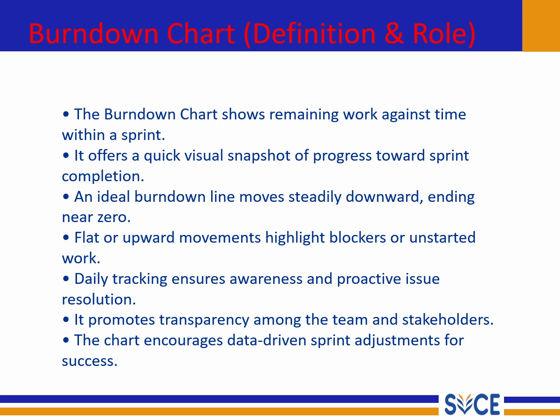You don't have to go through the reports, just a glance at the chart tells you whether you are on track to finish on time. In a healthy sprint, the burn down line should move steadily downward, gradually reaching near zero by the end of the sprint. That downward slope means the team is completing the work at a steady pace.